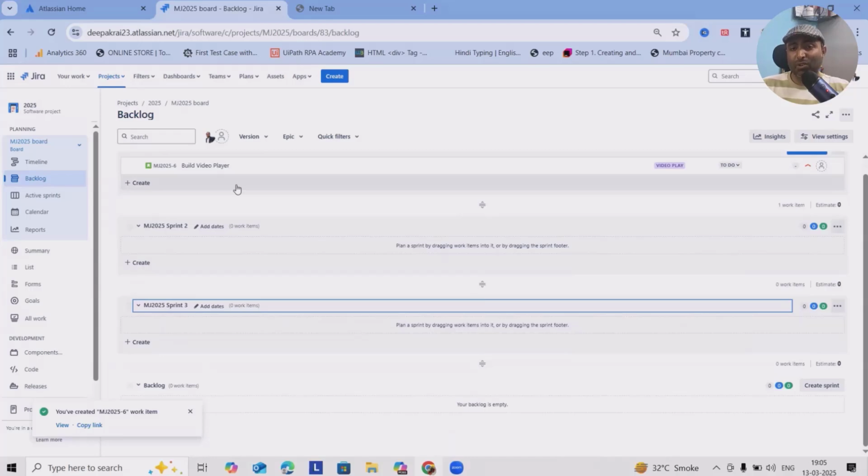And sprints, as I mentioned, are a time box. Normally, when we have sprints, user story points are also important. What are story points? A way to estimate effort or complexity is majorly called story points. Instead of hours, teams use numbers, the Fibonacci series, or they also use t-shirt sizing. If you don't know about these concepts, I've already created a detailed video as well as a detailed course. Whichever way you are comfortable with, feel free to refer from the description.